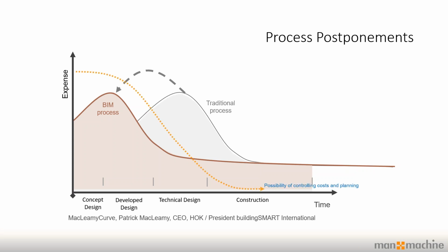Essentially, the possibility of controlling the costs goes down the further along the project we are. And obviously the cost of those changes goes up because we've got to send back materials, we've got to fix things whilst on site. Whereas if we find the problems earlier, we can fix them very easily using technology, using designers on a piece of software.